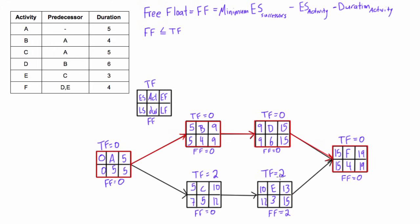Why does activity E have a free float of two while activity C has a free float of zero, even though both have a total float of two? Total float is the amount of time you can delay an activity without increasing the project length. If we delay activity E by two days, it starts on day 12, finishes on day 15, and that 15 doesn't push back the early start of activity F, which already had to start on 15 because of activity D. The project still ends on day 19. The same logic applies to activity C — delaying it by two days leads to the same end date.